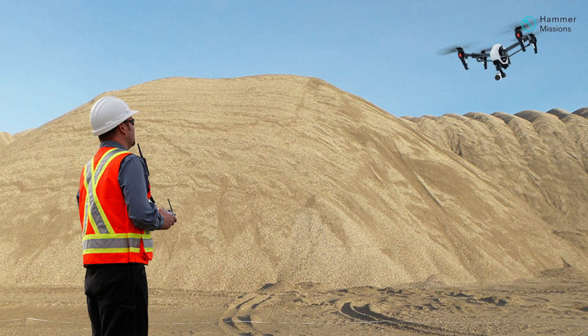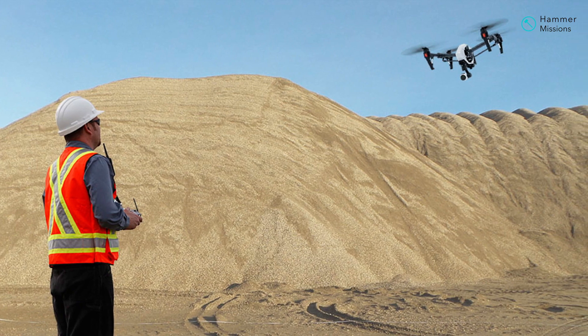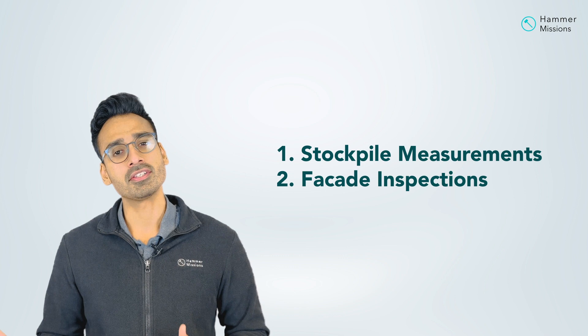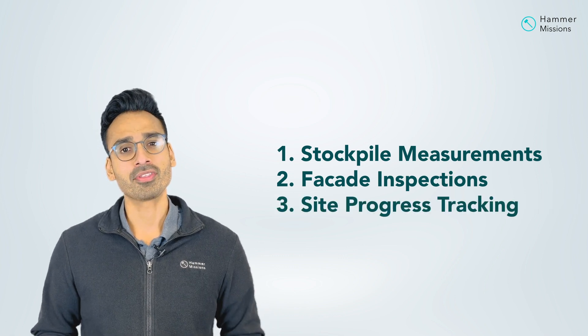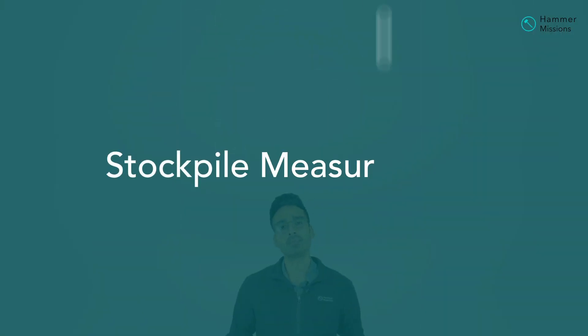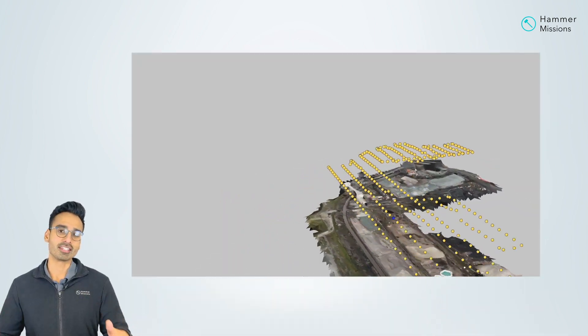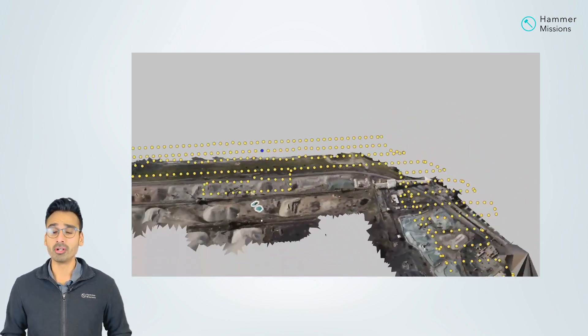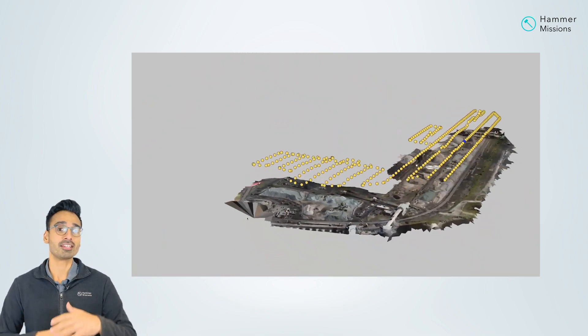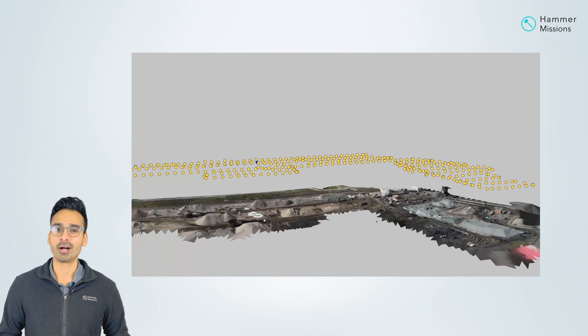Construction and mining is an industry where drones are extremely helpful tools to understand what's going on on the site. If I have to list three main applications, I will go for stockpile measurements, facade inspections, and site progress tracking. Stockpile measurements is an application where you fly your drone on the site in a structured manner, collect all the drone images with overlaps between them, and you're able to create a 3D model of the site. Once you have that 3D model, you can use it to create all sorts of measurements, but most importantly, stockpile measurements.